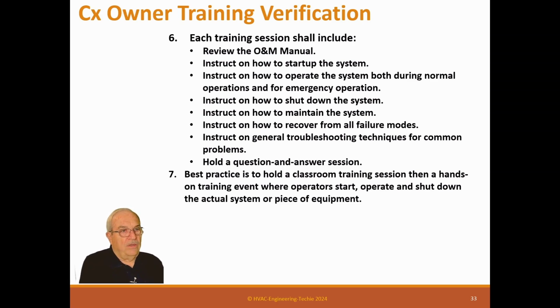And maybe the owner has 10 other systems exactly like this. So that training session might be able to be shorter. You know, they need to know where it's at in this building and what is happening, but they may not need to be trained. They may not all need to be experts on it. So what we've always done is gone in with the owner, looked at all the training, and we've extended some and reduced some depending on his needs, so his people get better trained and the general contractor does not have an extended length of time. And it works really well.